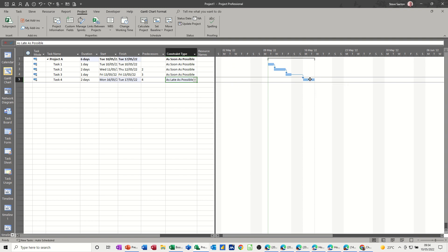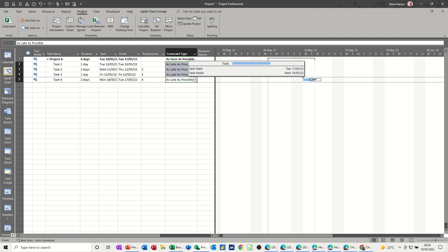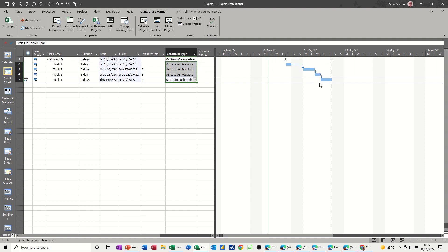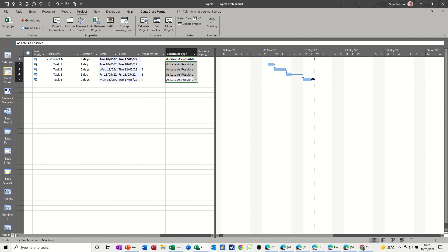Now if I want all of these to move, so I don't want it to do that. I don't want that to happen, so I'll just do Control-Undo, Z. If I put all of these to as late as possible, and then see what happens now. So if I move that forward, they all move forward, because they're all as late as possible. So changing these constraints is going to affect all of these. And because I'm moving it, you see what's happening there?